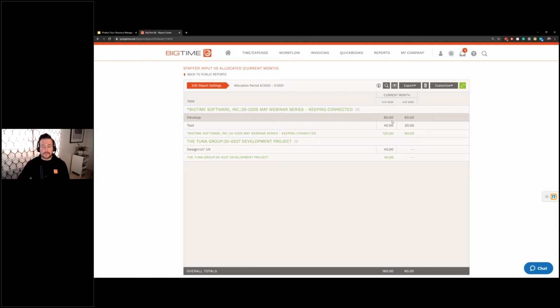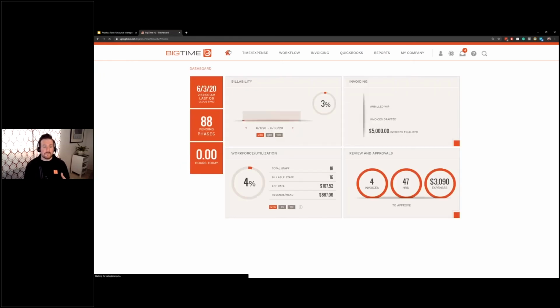I'm assigned to development for 80 hours. I'm assigned to test for 40 hours. Here's what I've logged to date on this, 60, 20. Of the 120 planned hours for me, I have only logged 80 on this. For this group here, I haven't gotten started. So there's the ability to share with staff their planned workload based off of their capacity and let them keep an eye on how they're inputting time against it. It will all tie into what data you need, how you need to see it, and who you need to share it with, given the conversation.